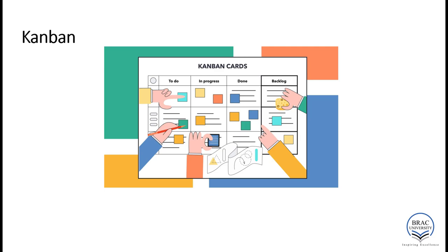And in the picture, this is like a typical Kanban chart. So a typical Kanban board has only one task in each row and a series of progress milestones in the columns. You can use note cards or markers to show how each task is progressing, and you will find lots of different examples on the web like the Kanban cards. So Kanban actually lets everyone see what's happening, and it makes it easy to catch tasks that may be stuck or that are slipping behind.